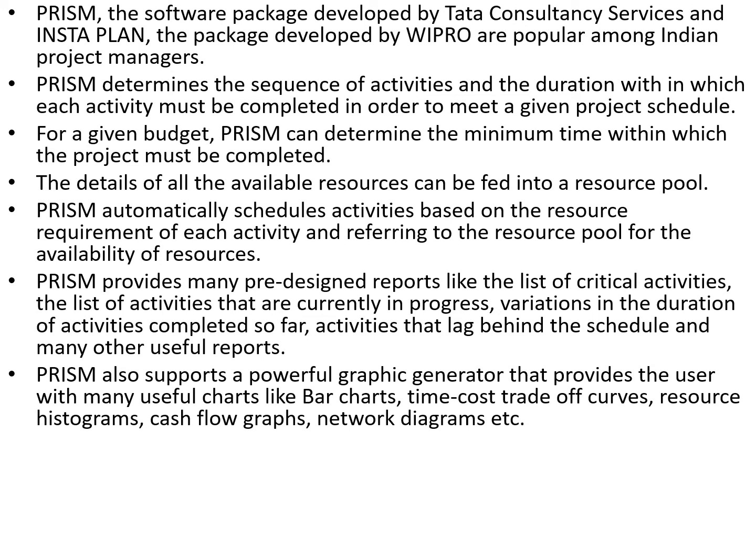Once these things are over, then resource labeling is required. A network diagram or Gantt chart does not take into account the resource usage. It is the last step. Resources are assigned to each task and schedules adjusted to account for the availability and the cost of resources.